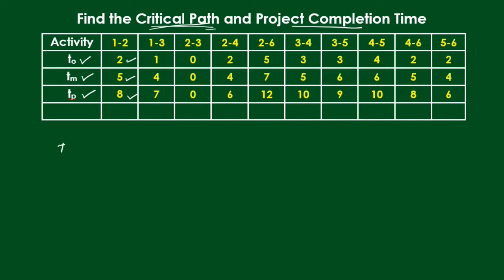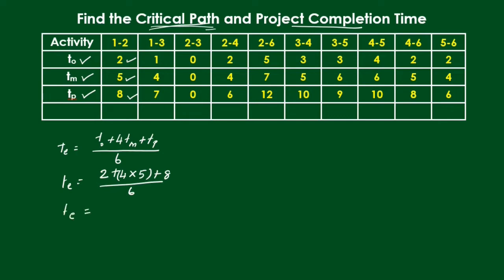Using the formula: estimated time TE = (T0 + 4×Tm + Tp) / 6. For activity 1-2: TE = (2 + 4×5 + 8) / 6 = 30/6 = 5 days. So the estimated completion time of activity 1-2 is 5 days.